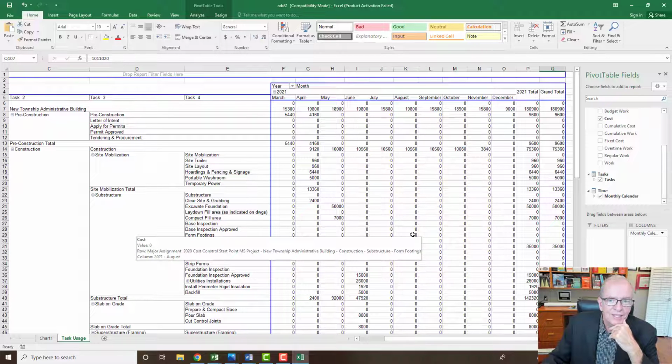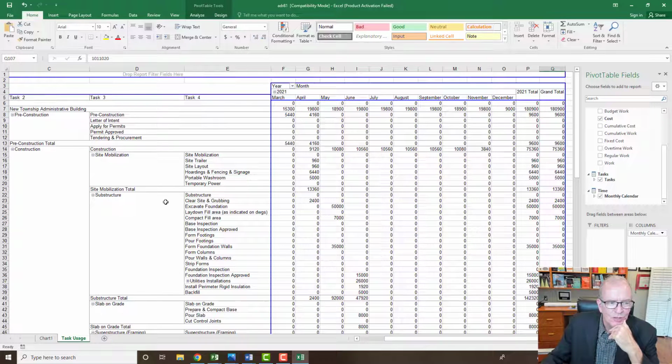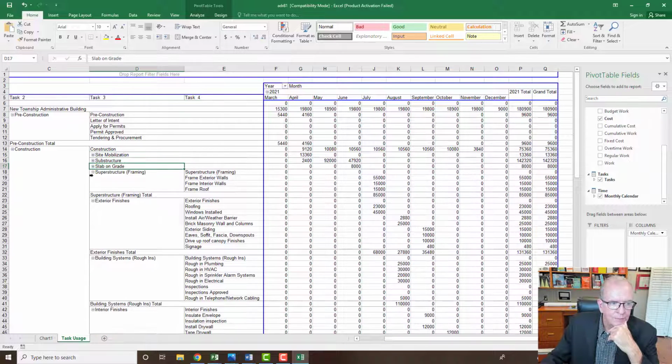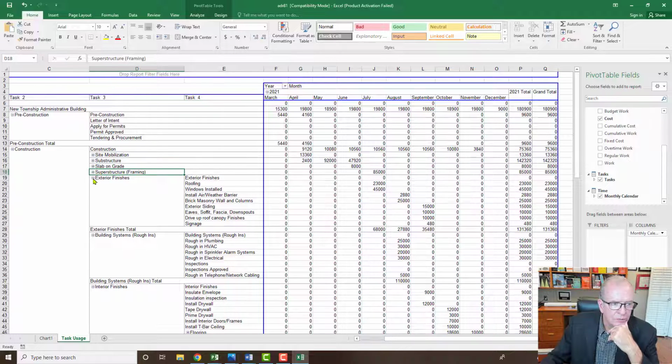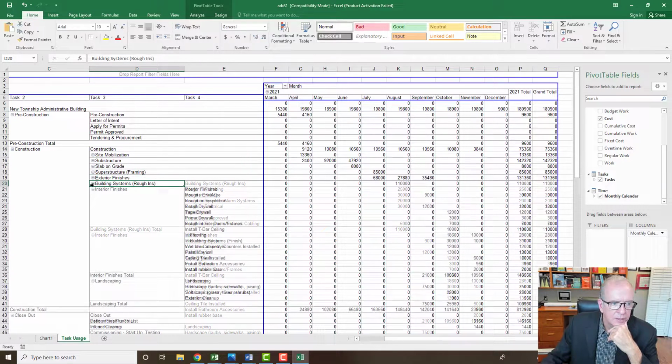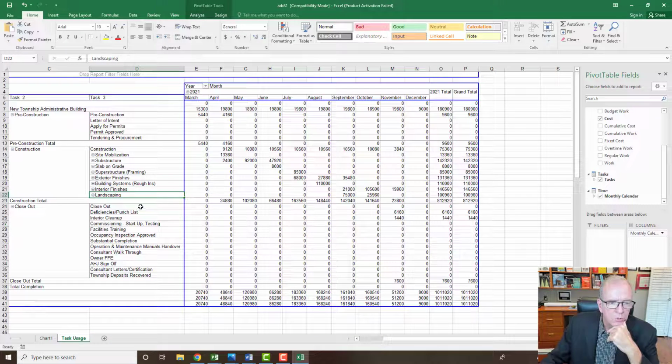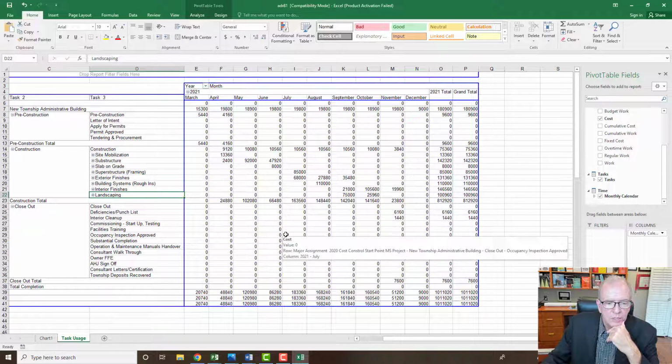Now if you want to see it at different levels, because maybe this is too granular for you, maybe you don't open up all of those ones and you just have it by the various higher levels on your project. So that's the nice thing about having a good work breakdown structure. You can open and close it, and so now you're just looking at it by these levels, the cash flow that's moving out by section in those particular levels, right?